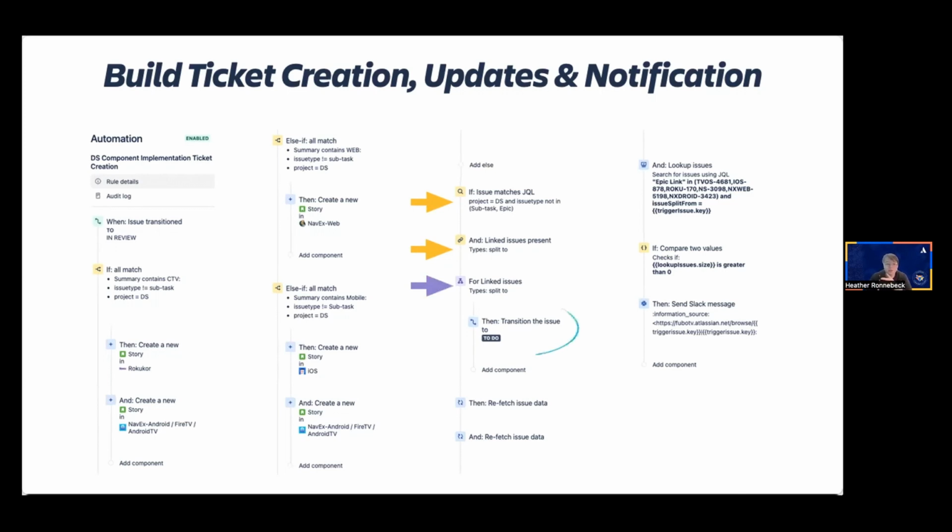This transition covers both the tickets we created in phase one as well as all the tvOS and smart TV tickets that already existed with the issue linking. Just for context, those two platforms wanted their tickets created at the beginning, when the design story ticket was created, not at this stage.